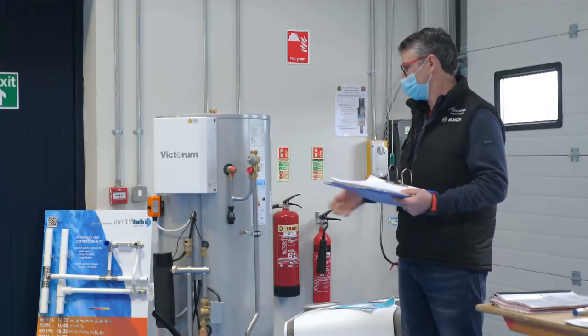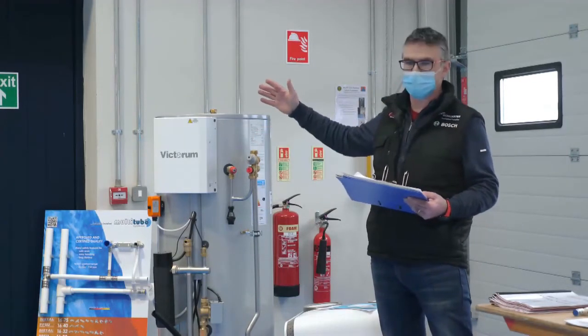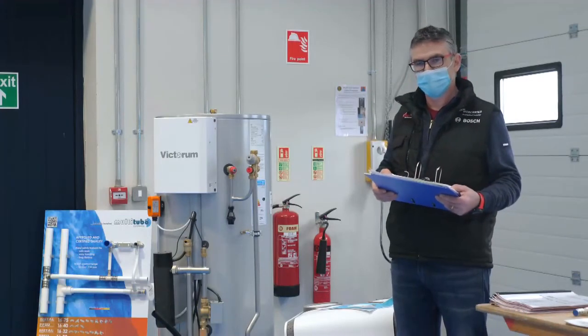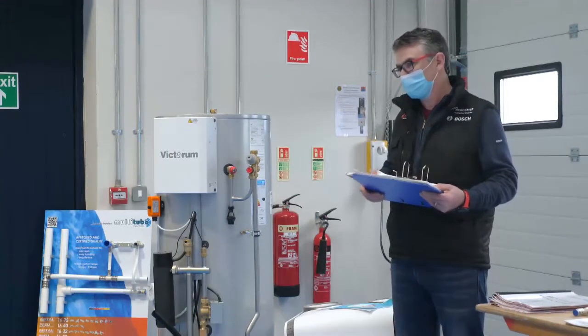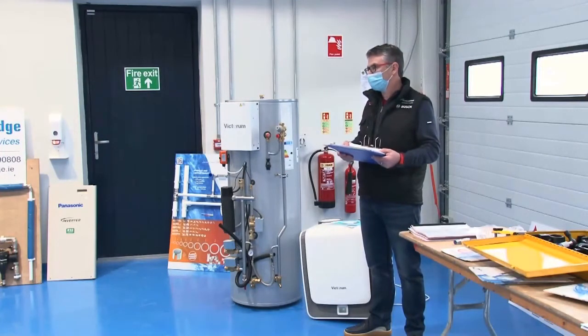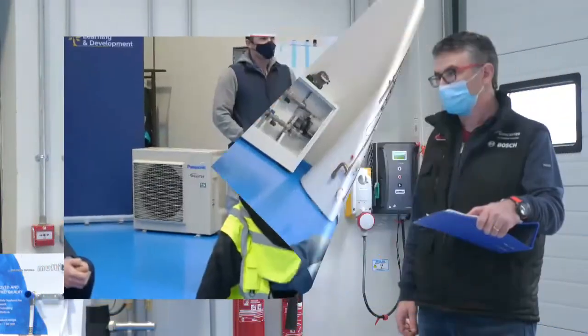So you'd hope that you'd open the hot press door, you'd see the external valves here, you'd see that they'd be all tagged and there'd be a corresponding valve chart close by it. Yeah, so again, that's part of the regulations as well. Any heating lines hand over information has to be provided. And possibly demonstrated as well, right? Yeah.